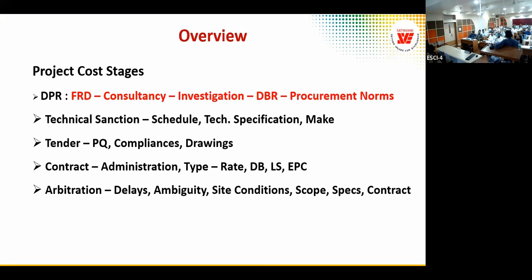Sir, "good for construction" is a term we use many times. Is there any clarification there, any criteria? See, in the tender, when we provide the drawing, we say this is for bidding purpose. Because we are not sure what scope we are going to release and what scope we are going to hold, that's why we put only bidding. Otherwise the contractor cannot, just based on the letter of acceptance, start the work with those drawings. So we have to reconfirm; sometimes you have site handing over issues.